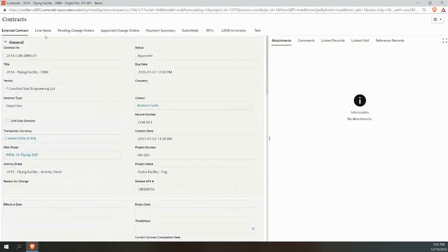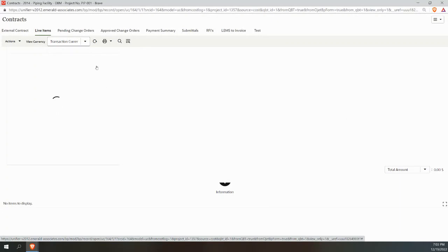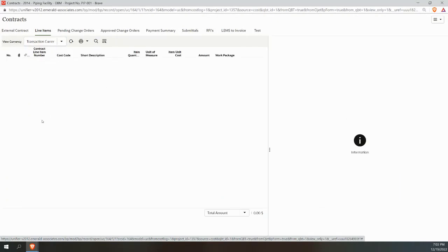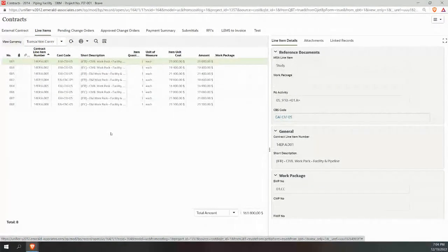So we've got, in this case, this contract for Crawford Engineering. This is the master service agreement that we were using against or referring against, or perhaps picking unit rates that were agreed, that sort of thing. And then we've got some procurement that we've done. Okay, now it can be multiple lines, as in this example. They can be lump sum, they can be unit rate line items.